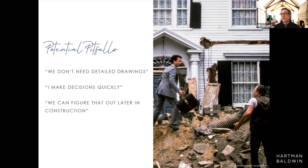Okay, that's fine. But I also have heard stories of people doing a remodel who come home at the end of the day and their contractor is sitting there waiting for them, and he says, hey, we're ready for your kitchen sink. We're going to put it in tomorrow. Whoa. Okay, what does that mean? Maybe the kitchen sink you really want, we have to order from the plumbing supplier and it's got a 2-week lead time. Are you going to stop the job for 2 weeks to go and get that sink? Or are you going to go to Home Depot and pick up one that's off the shelf so you can just get this project done? Those are the kinds of things we can figure out in construction, but it's opening us up to all sorts of cost overruns, the loss of schedule, and not getting what you want. That's probably the most important thing.